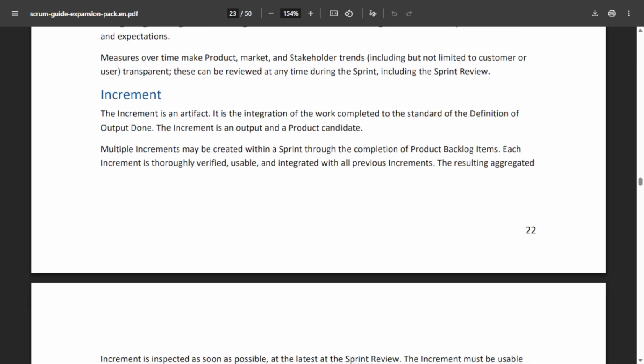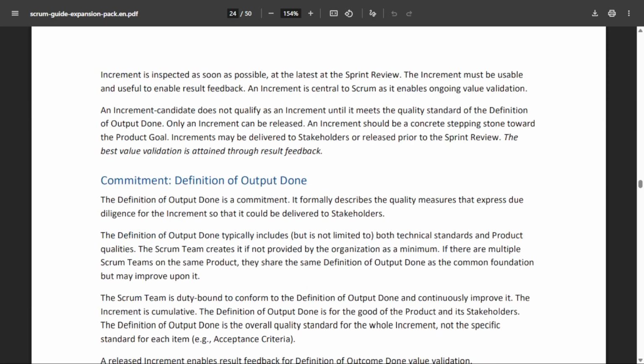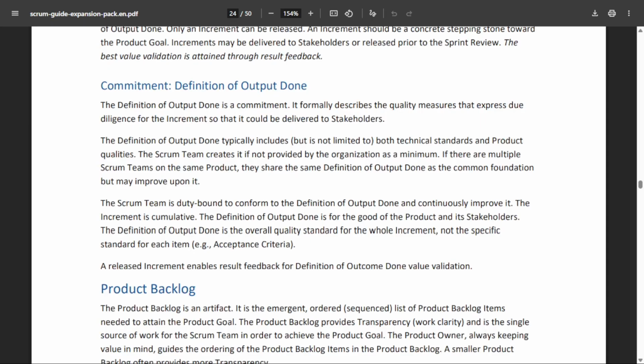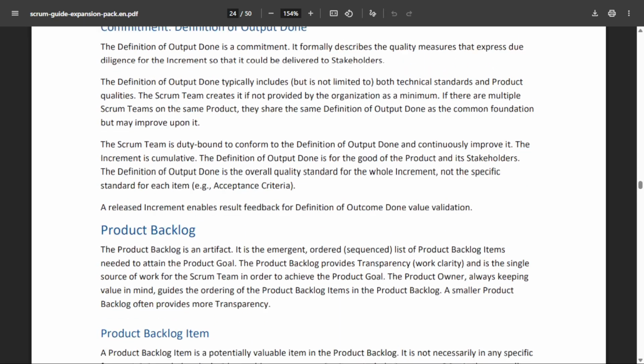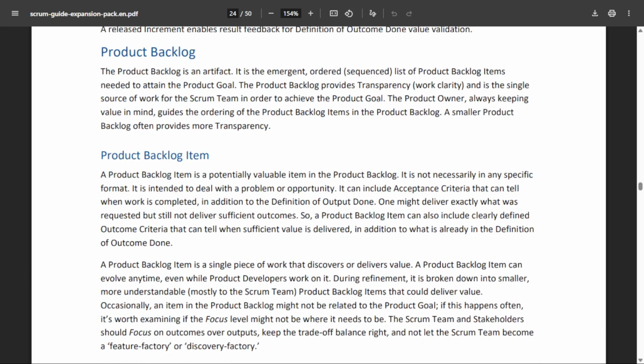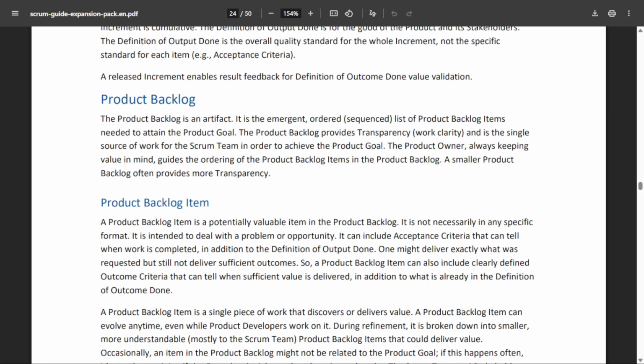And inside the document itself, we have a definition of increment. We also have the DOD, the definition of done, talked about. The definition of output done and the definition of outcome is very important. Okay, moving on, we have product backlog. So here, this would be under backlogs. Under backlogs, we have a dynamic list of needs. That's your product backlog. Under backlog items, we understand that we must define both acceptance criteria, which is measurable, and outcome criteria, which is value oriented.